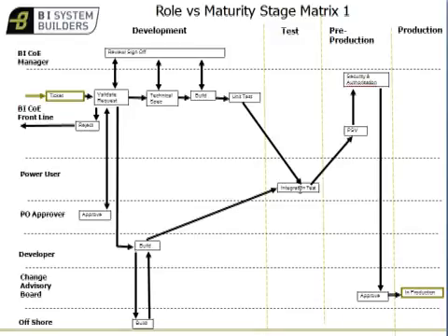It passes integration testing, goes to pressure, stress, volume testing. Pre-production environment is often overlooked, but it's very important, because a pre-production environment is the first opportunity you'll have after development to seriously test your solution on high volumes of data, certainly in a BI classic data warehousing environment. Once it passes PSV and UAT, it can go into production. There's also a flow that runs down to developers, and the developers may work with offshore.